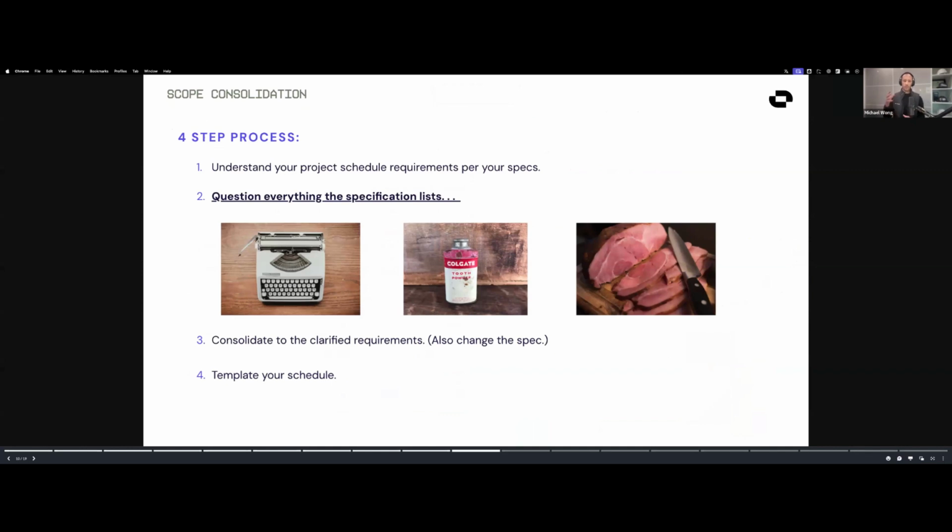Thank you to whoever asked for that. It's really about confirming what the specification requirement is, down to the root of it. Okay, I know that we need a 2-level schedule, which means your first work breakdown, and then it goes into a phase that includes some trades up to a 10-day duration or something like that. It should be written to be a very clear, quantifiable requirement.